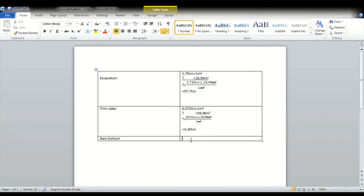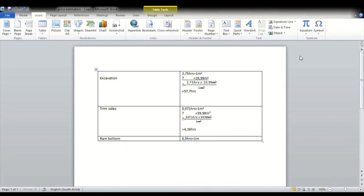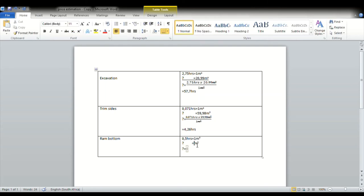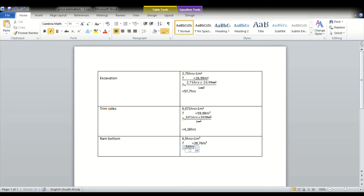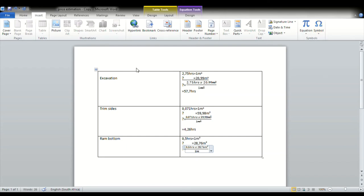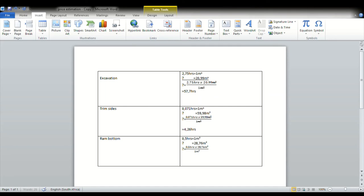Now let's get to ram bottom. So we'd have 0.5 hours equal to 1 square meter. Therefore, we came up to an answer of 28.76. So we'd have 0.5 hours multiplied by 28.76 square meters divided by 1 square meter. Perfect, that will give us an answer of 14.38 hours.